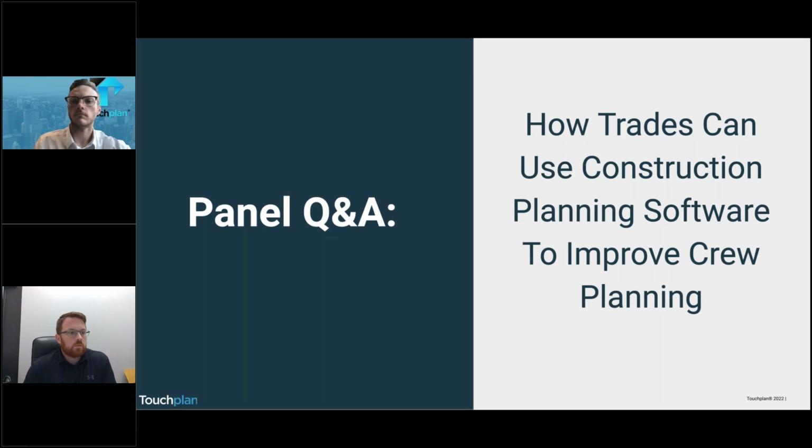See if we can level this manpower out. It's a weekly exercise, but we've got it down from 40 to 50 hours to Ben putting in 3 hours in the morning, and then an hour with each of our scopes. So it's gotten down to under 8 man hours. Touchplan is part of that.